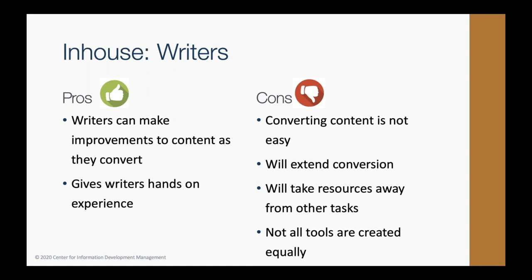One important thing to remember is that even if writers are handling the heavy lifting of the conversion using some conversion software that you've purchased, you still need somebody who's going to review the resulting XML to make sure that it meets the must-haves, the minimal viable product requirements. So you can see here some of the pros and the cons of having the writers do the conversion.